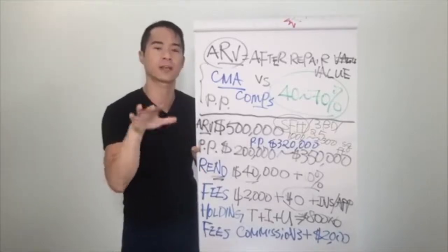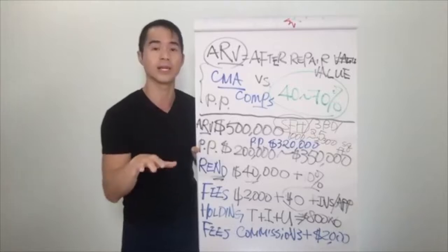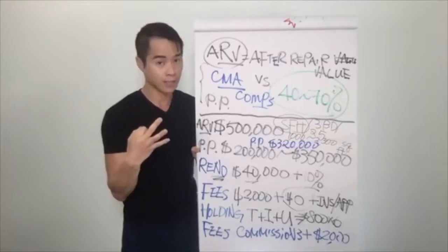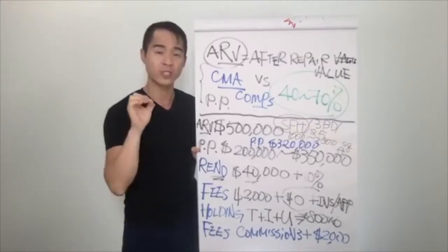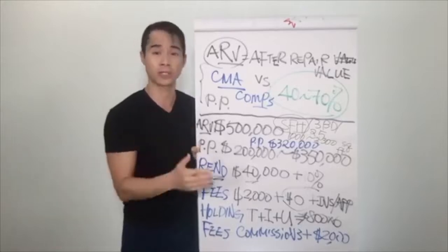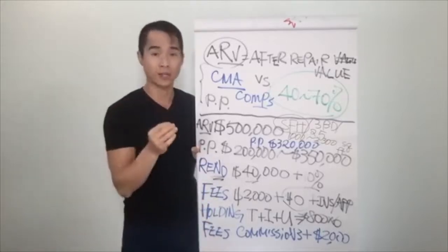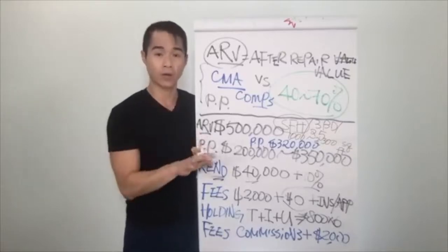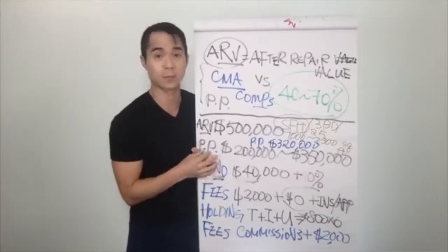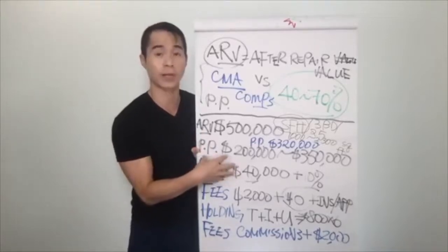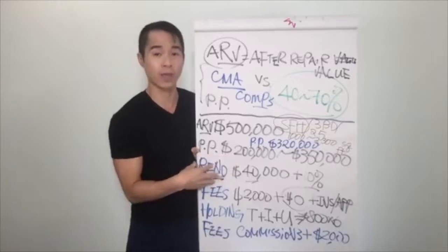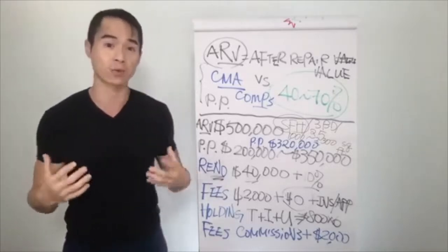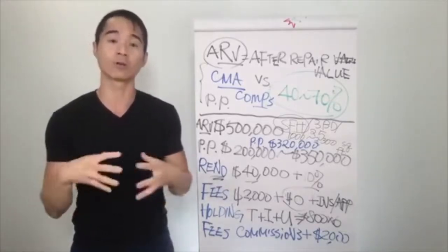So just make sure that you get the proper quotes that you need, especially if it's your first deal, from a minimum of 3 different contractors. Unless, again, you've already got a very solid recommendation either from a real estate investing coach or a mentor, and you've actually seen their work as well. Even if that's the case, instead of getting 3 different quotes, you want to get at least different references in terms of other investors' experiences working with them. So time is everything, which means you always want to ask them whether or not they were able to deliver the project and complete the renovation on time, and how close they stick to budget.